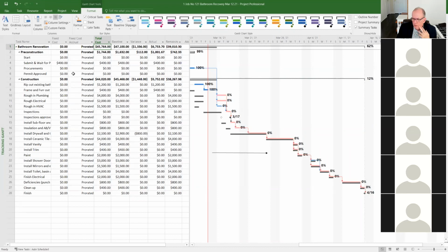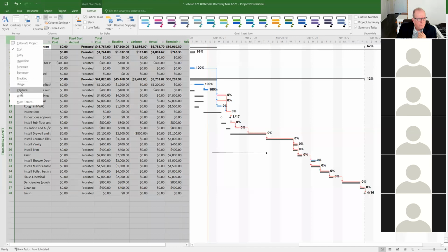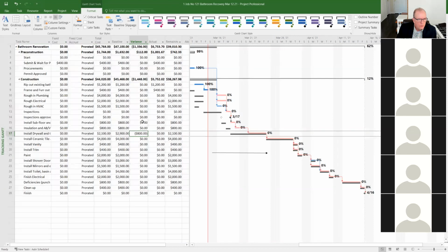Well, is it because you reduce the days, sir? Go ahead, Sanjay. Is it because you reduce the amount of days they work, so you save on cost? Yeah, so I've reduced the amount that I had those trades working on those days. So they're definitely saving $800 right there, right? So I'm reducing the work that I had them doing there.